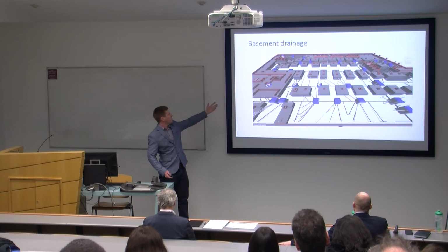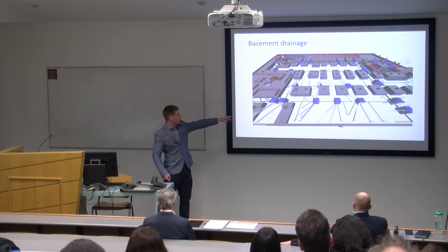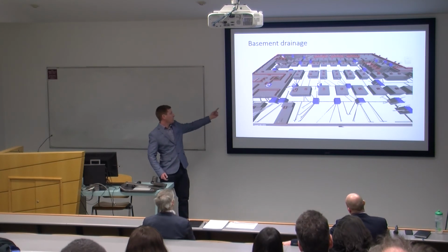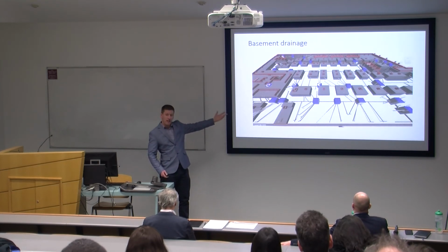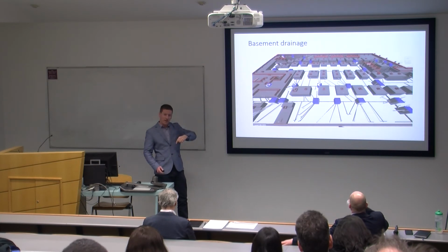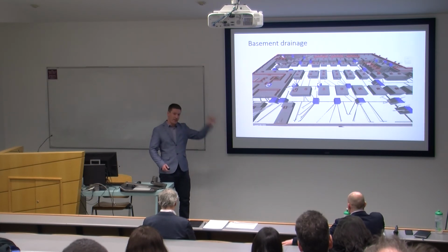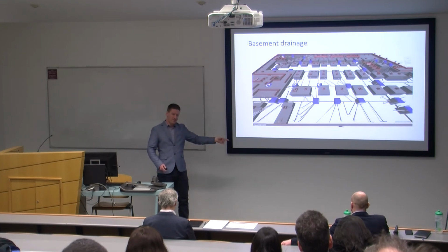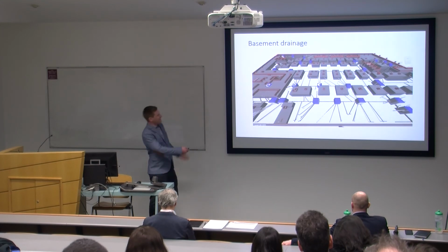You have three major models of that. You have the superstructure, you have the drainage, and you have the as-built drainage as well. And again, we used the GPS coordinates and the levels directly on the machine to set that out. There was a schedule of invert levels for all the chambers, but that schedule was extracted from the model. So we went to the model to set it out. But we had to check what they'd done to make sure, because again, we were doing that at risk the way the project was, you know.